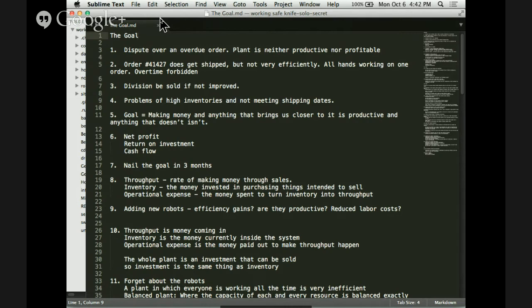This is very crude, but that's what mathematically you want, is this, you want that bottleneck to keep working all the time. You can reduce their workload, but you want no downtime, because that is really expensive. You see, when I say expensive, you get the point, right? You're not producing output. When you're not producing output, you're not getting throughput, meaning money. You want to get money, you want to find out the slowest point, you want to find out the bottleneck and take good care of them.